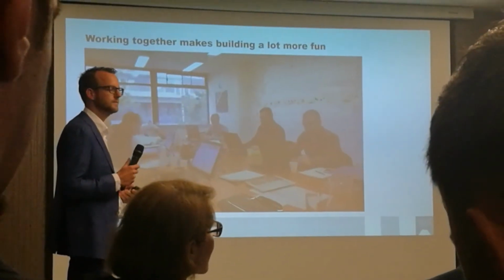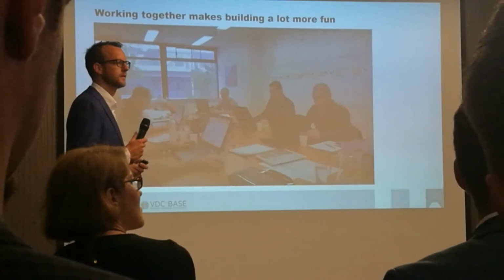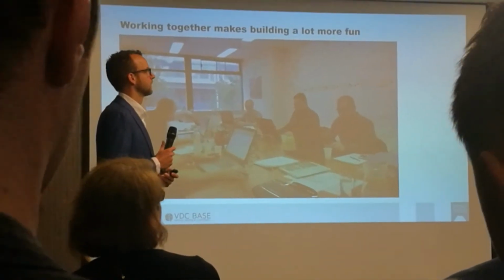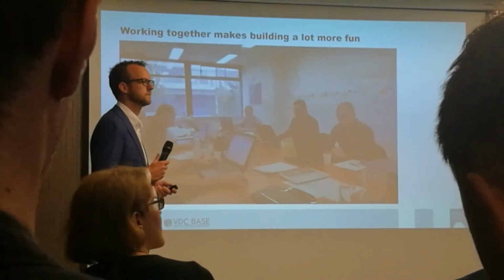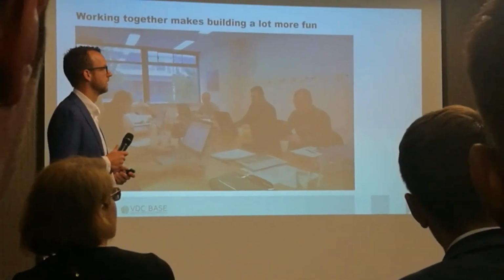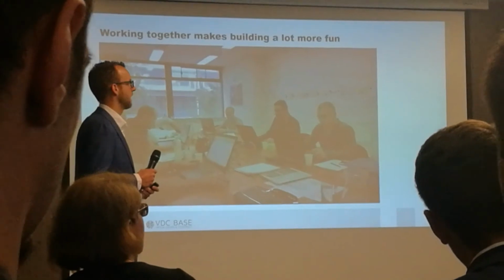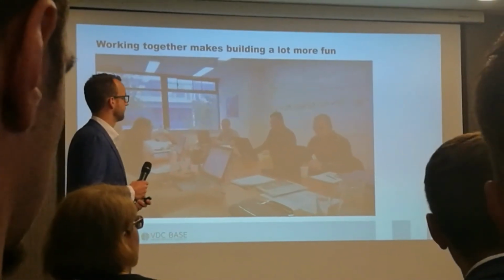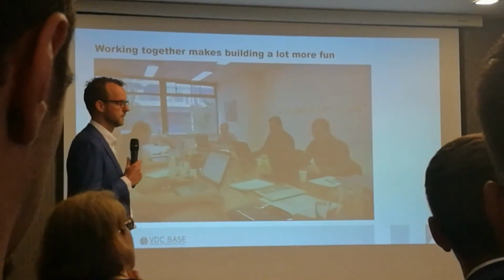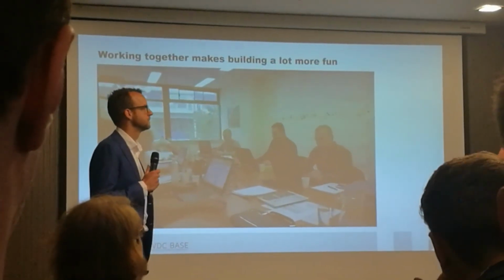Mr. Kober, yeah, sorry. A short question, did you actually share the model at the same time when you were working there, so you had something like one model, or did you have a federated model, meaning that somebody worked and then you upload it, somebody uploads it back? And we had two different things. We were sharing all IFC files on a kind of common data environment where we share all the files. So not sending by email with WeTransfer or something like that. And we also had, for the designers, the Revit server. So we had a server system that they were always linked on the two systems. And for the suppliers, we didn't use the Revit server because they don't work with Revit.